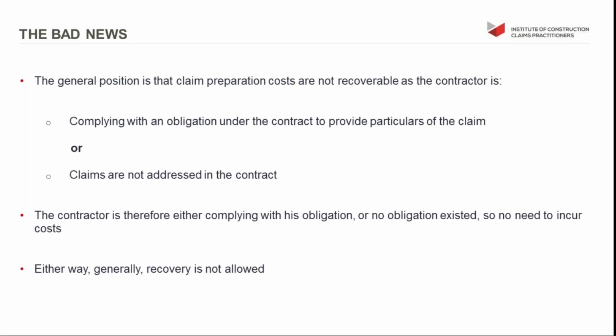So either the contract is just complying with an obligation under the contract to provide the particulars, and it's all included within his contract sum, or else providing the sort of detail within a full claim is not something that a contract requires. So either way, recovery is not allowed. And that's why we generally find it so difficult to recover the costs of claim preparation.